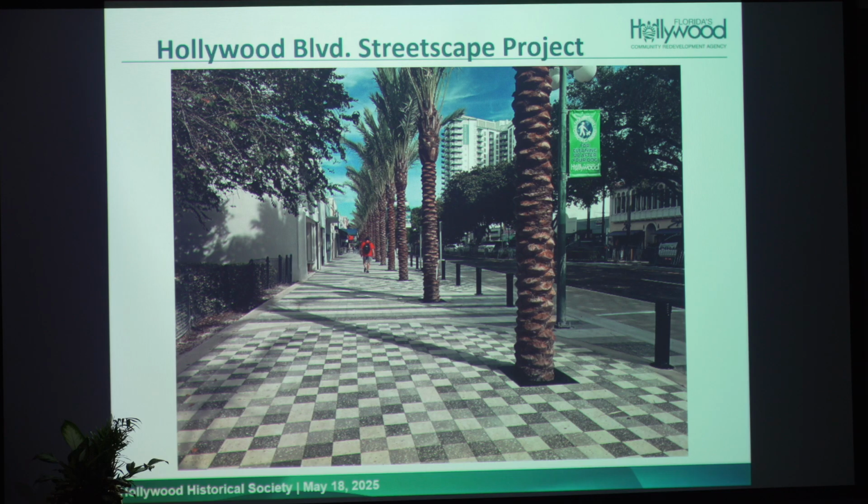And really it was the underground utilities that, regardless of a streetscape project, had to happen. So underground utilities would have come in and basically torn up the street for quite a period of time, because that was the longest element. When you're underground, you really don't know; sometimes the mappings are not correct and you don't know what you're gonna find. All in all, it worked out quite well, and we were able to utilize that time schedule with utilities so that we were able to work on the beautification while they were already opening. It's kind of like opening up the patient and doing multiple surgeries.